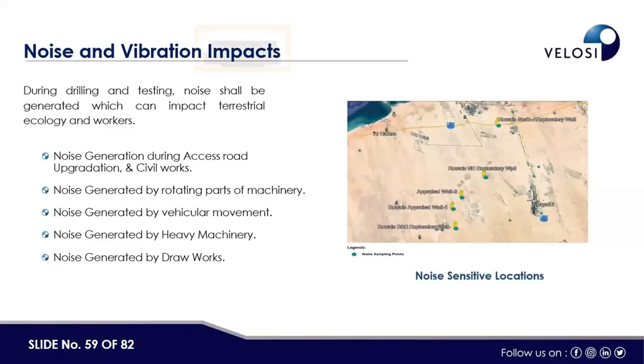What is the time limitation in reporting an environmental incident to the authority? It again depends on the regulatory authority, but I guess in every region it is a mandatory requirement from the regulatory authority to report an environmental incident immediately. Immediately we have to notify them either through official letter, email, or telephone with proper record, so that it can be identified that the reporting is done.